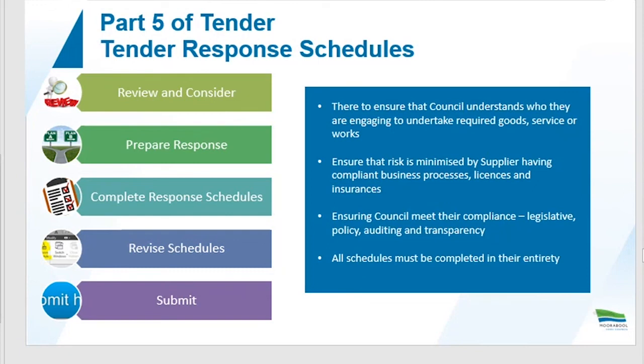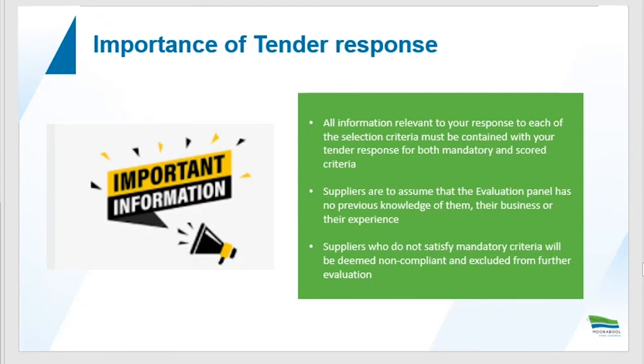I just want to also point out here, the failure to complete any of those schedules may deem that your submission is invalid and we can't evaluate it. So it is quite critical. If you're having difficulty ever completing any of those response schedules, you can always reach out to the nominated person within that contract to clarify or confirm what is required of you within those schedules. I've just covered this slide here. So the importance of the tender response is quite critical to making sure that you do have a valid submission that we can evaluate.